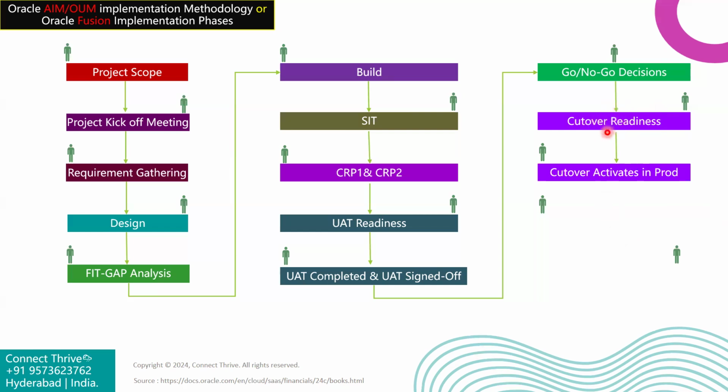We will never load open transaction data in our production instance before the setups. We have to complete the production configuration for each module, and only after that we will load all the open transaction related activities for each module. Then we will announce the go-live based on the back date or cutoff date to the respective business users.